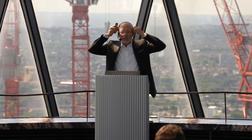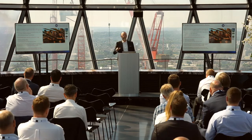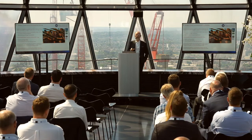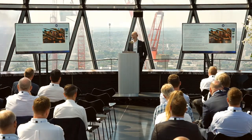Most design engineers are not happy when you tell them you're going to do a commissionability design review. I've had the Braveheart situation a couple of times, because it's a level of scrutiny that they're not used to, right? But as a commissioning provider, be clear, you're not doing a first principles design review, and you cannot write that report where you take on design liability, unless you're insured for it, right?